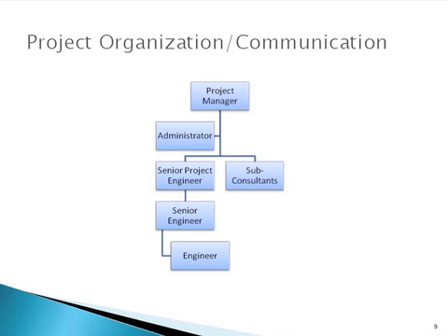To begin with, S&V Engineering is a relatively small firm. We employ 13 individuals, and out of the 13, 2 of them are owners. Of the 2 owners, one focuses on the marketing aspects, while the other one is the project manager for all of our projects. Since we are relatively small, and the fact that we could be working on up to as many as 4 projects at a given time, we do utilize the weaker matrix project structure.